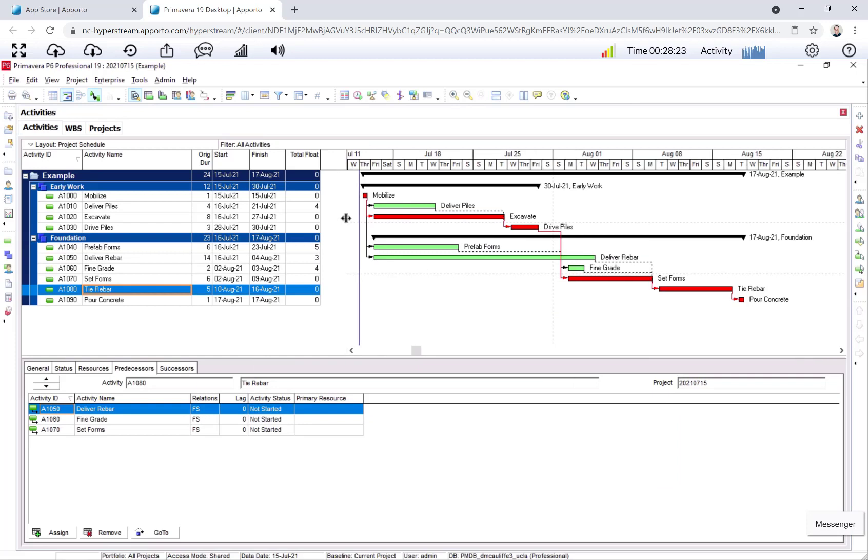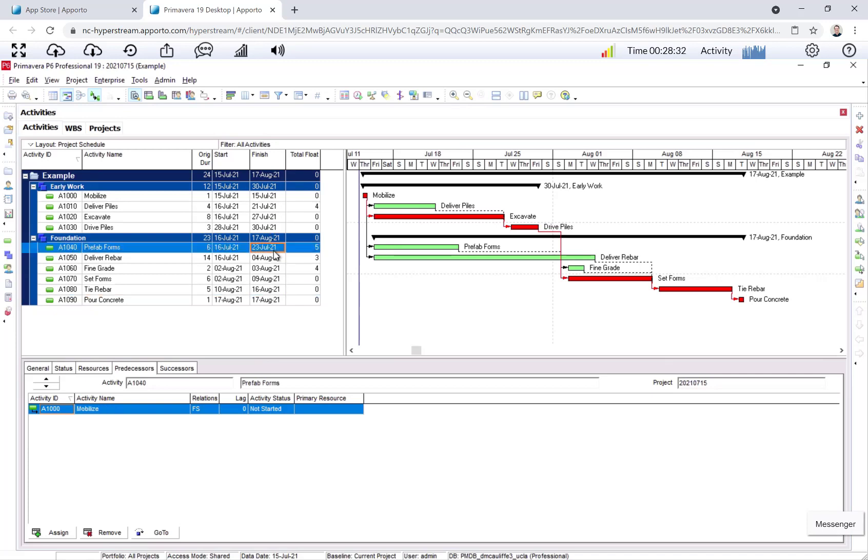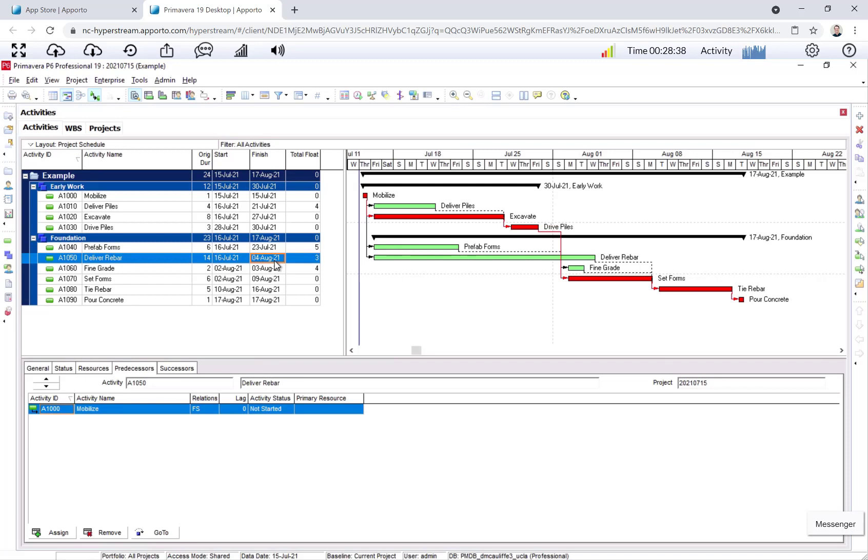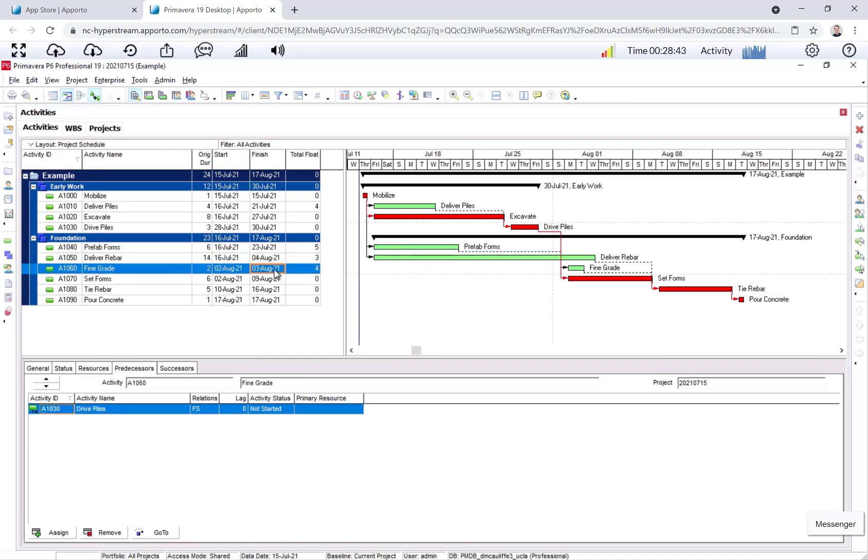So to check my work, I can see that I have four days of float in drive piles. That's correct. I have five days of float in prefab forms. That's correct. Deliver rebar has three days of float. That's correct. And four days of float in fine grade. My critical path is indeed mobilize to excavate, to drive piles, to set forms, to tie rebar, to pour concrete. All good. And I see my duration for my project is 24 days. That's exactly the finish date for pour concrete for the network diagram. So we did it correctly, that's great.